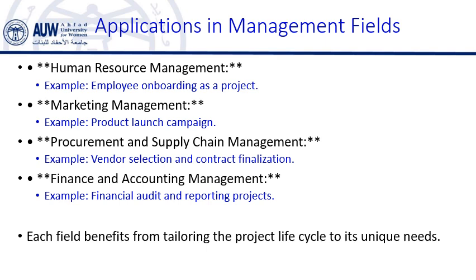In the monitoring phase, the vendor's performance is assessed against the contract terms, and any adjustments are made if necessary. Finally, the closure phase ensures that the contract is fully executed and finalized, and any remaining issues are resolved. The project life cycle ensures that the procurement activities are structured, risks are identified early, and vendors are evaluated systematically, contributing to better supply chain efficiency.